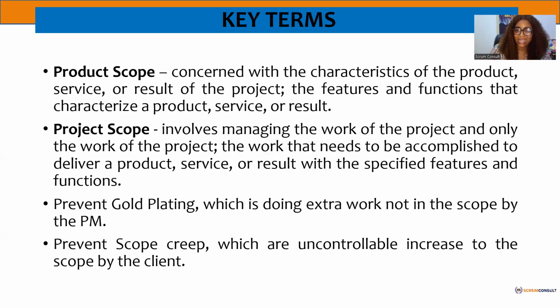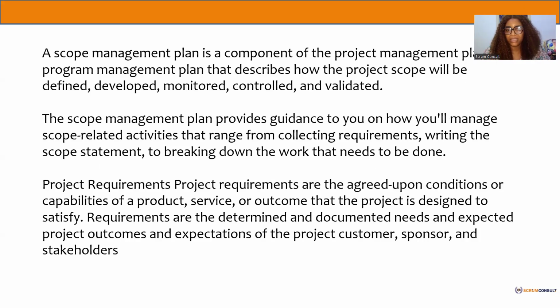Once you satisfy the scope, in project management, quality is defined as the ability to do what? To satisfy the customer expectations, or to satisfy the acceptance criteria. That is what we define as quality. Once you do that, and you now start doing extra work that was not called for, you're wasting time, in some cases money, and as such, it's still going to affect the outcome of the project. So please watch out for those two things, gold plating and scope creep.